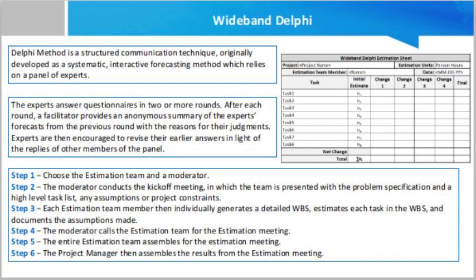Step 5.5 — each team member then revisits his or her task list and assumptions and makes changes if necessary. The task estimates may also require adjustments based on the discussion, which are noted for more effort or less effort. The team members then combine the changes in the task estimates to arrive at the total project estimate.